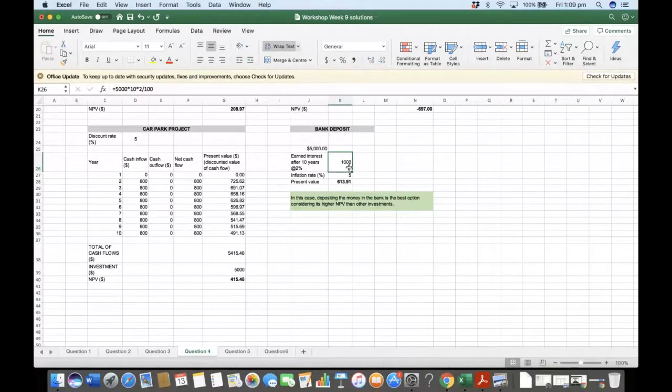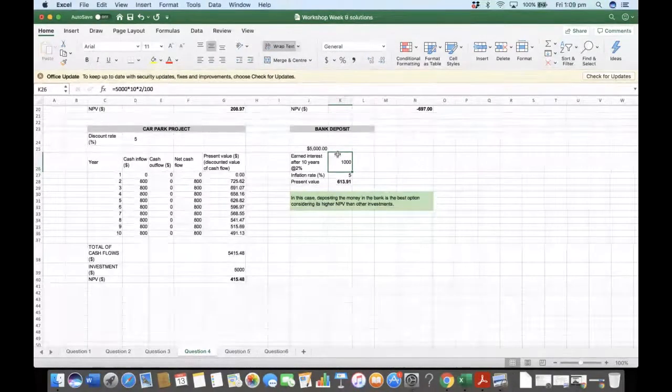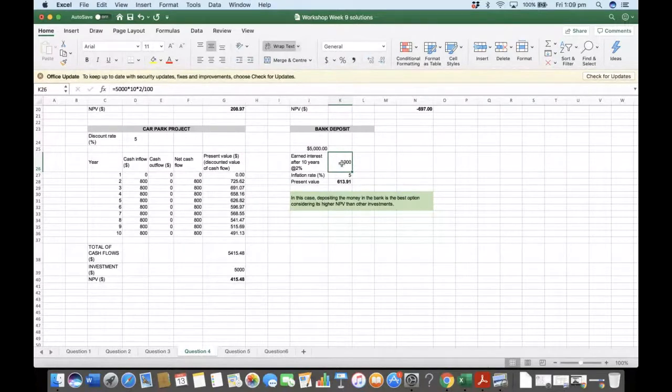So clearly you can say that this is a beneficial project, right? And you want to compare whether this benefit amount is higher than this benefit over here, or this profit over here. So what you want to do is discount the earnings that you are going to get at the end of 10 years to today's value, and compare the two.